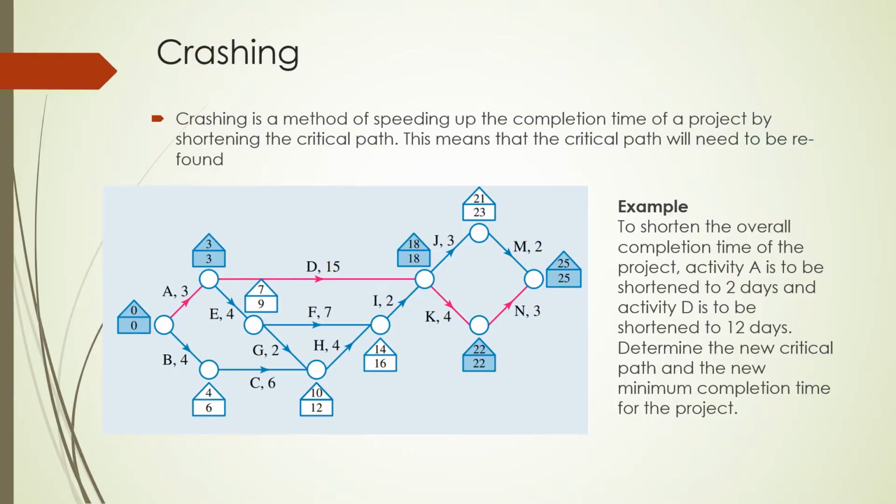Alright, so crashing is just a method of speeding up the completion time of a project by shortening the critical path. This means that the critical path will need to be refound.